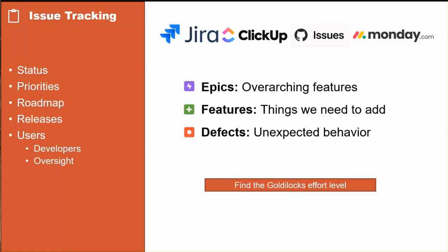That can be a challenge, finding that Goldilocks level of effort. If I have 2 developers and 3 stakeholders, maybe I update it once a week, maybe I don't need every single transition, maybe I can do bigger tickets that lump stuff together. But if I have a ton of users and I have 50 developers and NASA or the DoD is kind of hovering over looking at tickets, maybe now I'm going to be spending 50-50. And so finding that balance is tricky.